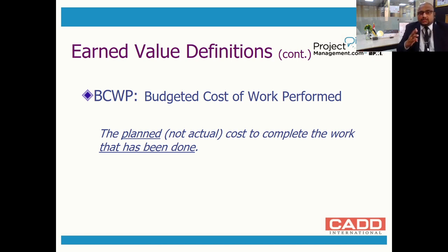So 4 rooms have to be done in 4 days with 4,000 dirhams. So if on one day I completed the first room as per the defined cost, what I get at day 1 is that I will complete the first room flooring with 1,000 dirhams spent.